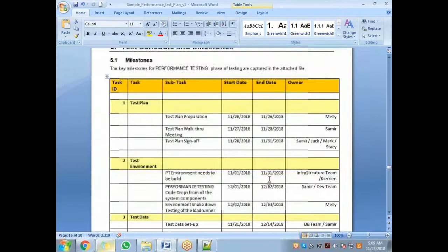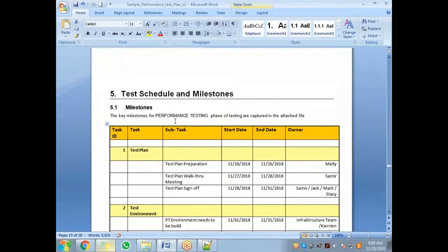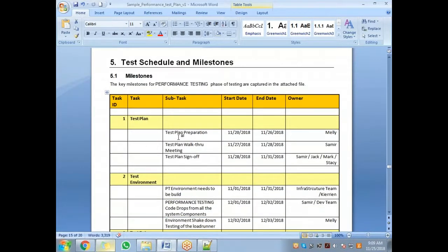So instead of you asking me, it's better you look at the test plan or the test schedule so that you right away know what your responsibilities are as a performance tester and when you will start your activity. Typically, before you start creating the test scripts, you would have 1 month. In that 1 month, you try to understand the business functionalities and the application, you read through the test plan and architecture, you go through the NFR documents, and see how the tool is. These are tasks you get familiar with in that month, not that you'll sit idle. But before you start creating the first script, it will be a certain time.